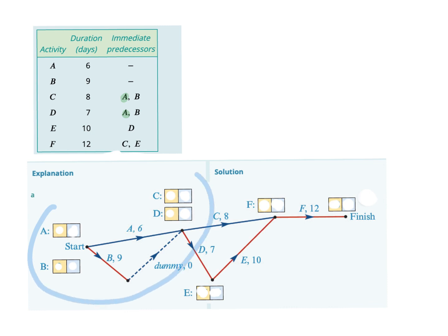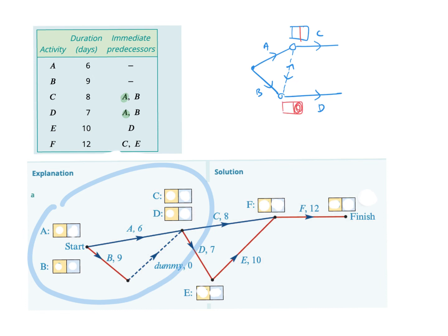So for this part up here, I had A coming out, and then B coming out, and we had C, and we had D coming out like that. And what we did is we put a double dummy in between those two. It's the same thing, but when we were backtracking, which means doing the red numbers, we had to take into account this number down here. So you had to be really careful.